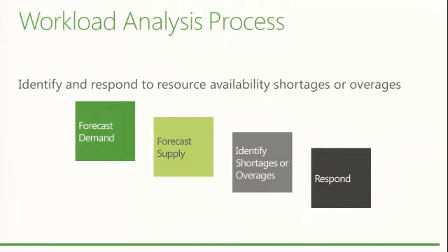So again, do we hire people? Do we retrain people? Maybe the people who have some excess capacity in other groups that have related skills, can we retrain them and bring them over to this project and get some help from them to keep the project on track? There's different ways that we might respond to either of those situations. But this is the basic four-step process, if you will.